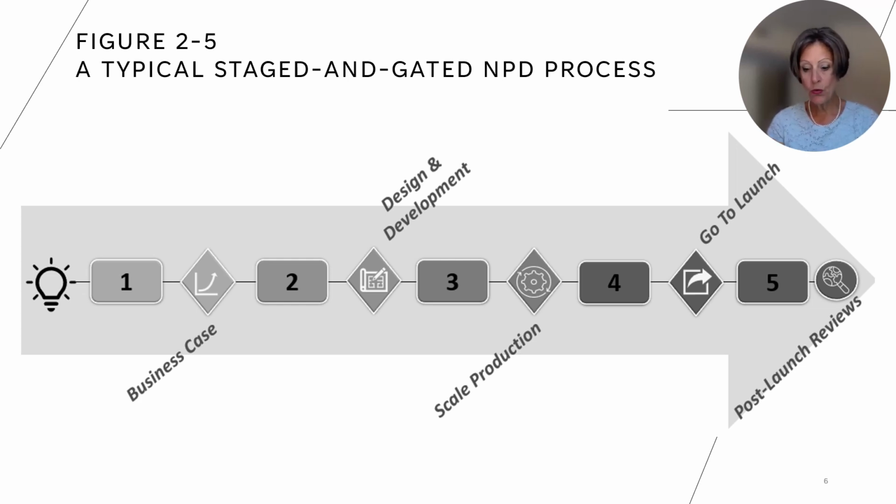At each stage, work is completed to address outstanding issues for the new product. Gate reviews, usually led by a senior management gatekeeping team, verify that the new product will deliver value to the customer and to the company. Validating the business case of the new product results in a gate approval and gives the NPD team permission to continue working on the project. Recall that technical and requirements uncertainties decline as investment increases, while the particular product or firm addresses overall business risks, customer, financial, technical, and people, by adhering to the staged and gated process.